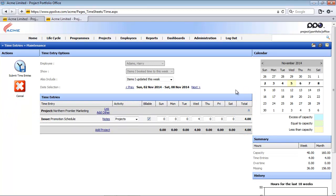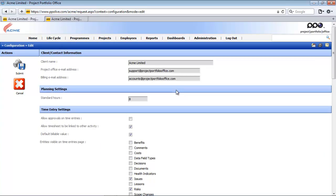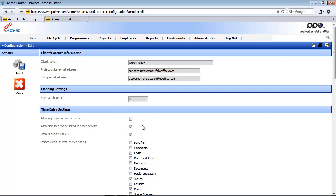If I return back here to my first tab and access the system configuration again, the next setting here says allow timesheets to be linked to another activity. This setting allows users to record time against an activity called other. So this means the time entries does not relate to a task, an issue or a risk.